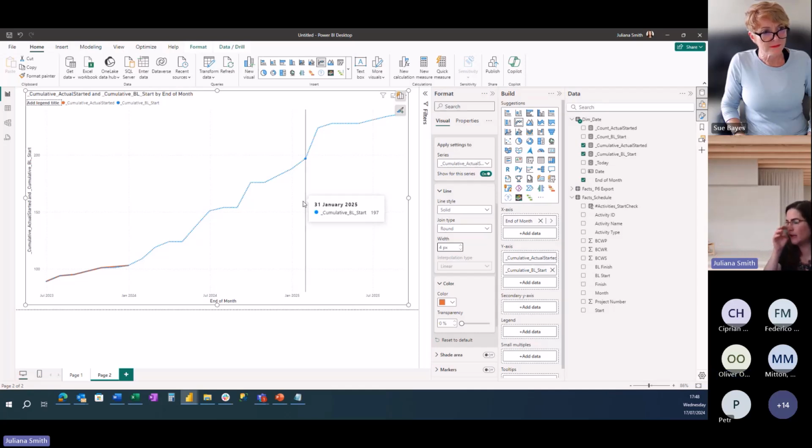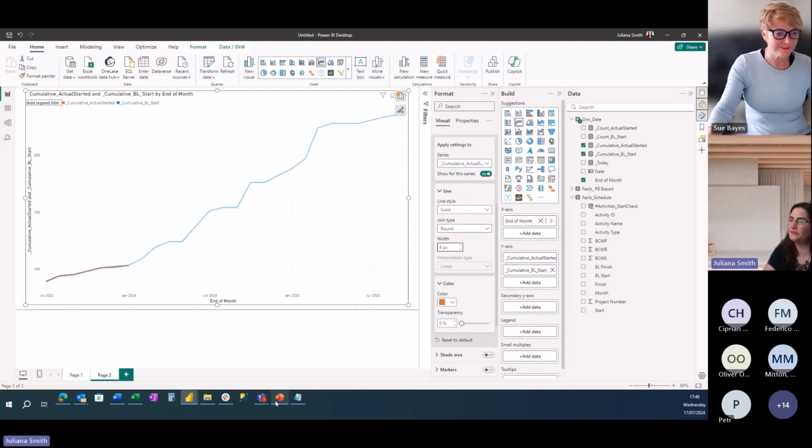That can be done in Power Query. You can create an additional column, and it's going to be a date add function. And then you create inactive relationships and you do the counts. So that's something interesting you can do to assess different scenarios. Like, okay, there is a massive delay and we need to assess where we're going to be. So that's something you can do as well.